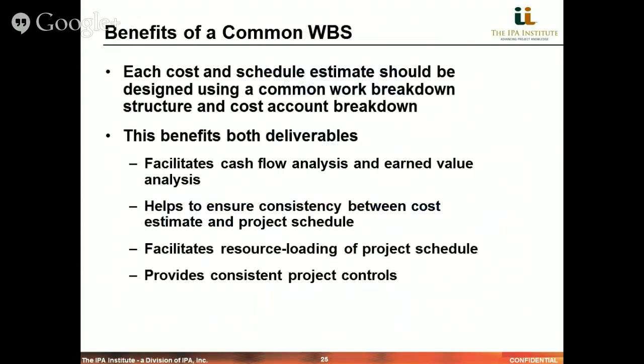Some of the benefits of a common work breakdown structure: they should be designed using that work breakdown structure because they facilitate cash flow analysis and earned value analysis. They help to ensure consistency between the estimate and the schedule, and to make sure that the entire project scope is included in the project. And also, it facilitates resource loading of the schedule.